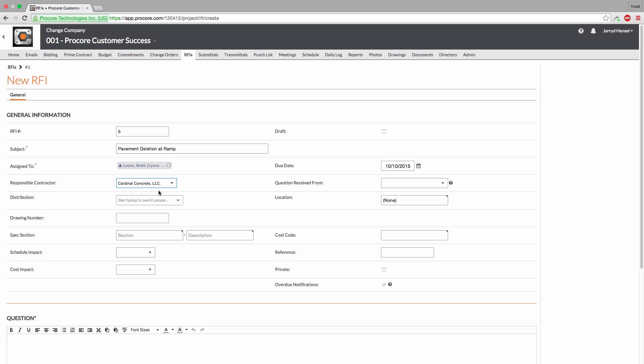To include other team members on all correspondence concerning the RFI, add them to the distribution list here. Distribution list members are able to comment on the RFI via the New RFI email they receive.